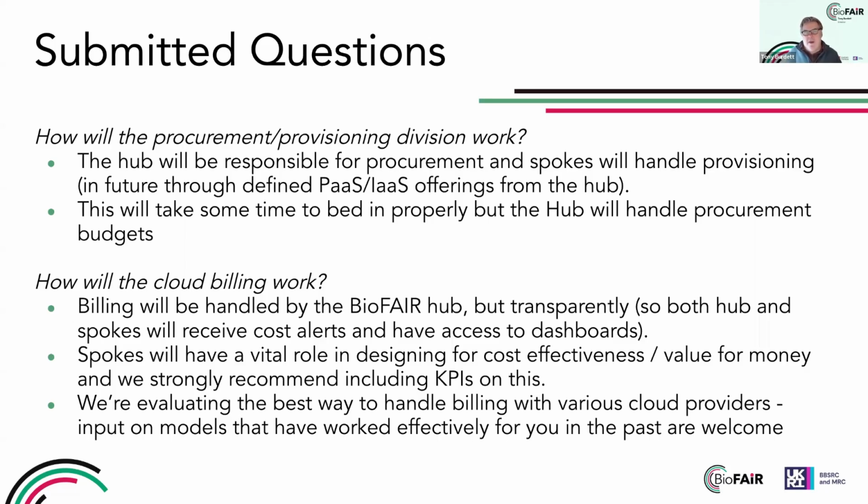So this is why we asked questions about what infrastructure you might need, what commercial cloud you might need in the expression of interest, and why we're asking you to build on that in the current proposal to make sure this works. I'll carry straight on to the cloud billing as well because it's related. For cloud and commercial cloud, what we're hoping is that the billing will be handled by the BioFAIR hub in a transparent way. So the hub and the spokes will get cost alerts and be able to see dashboards of how much they're spending. The spokes obviously have a vital role in engineering their services and operating them to provide cost efficiency and value for money.